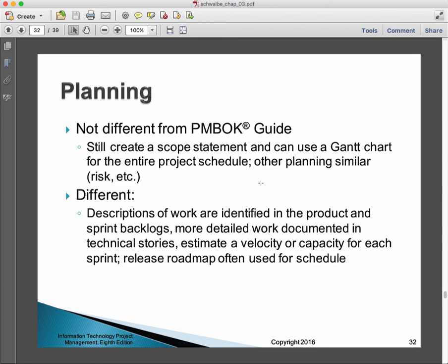In an Agile point of view, we say, here are all the features. Here's the workload, okay? This is the potential scope of the project. It's prioritized. We think that if we do a certain number of sprints as so many weeks long with a project team X big, that we can get enough of this project done that everybody's going to be happy. Are we committing that we can get it all done? No, we're not. So that's a different aspect of it.